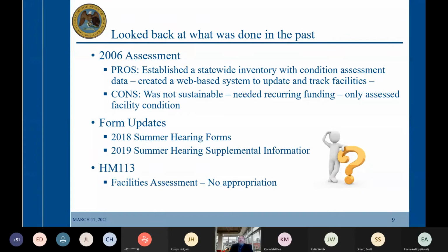That amounted to 17.3 million gross square feet of space. For those of you that were around at that time, you remember that 3DI Parsons are the ones that conducted the assessment. And in that assessment, as a whole, higher education facilities were scored with an FCI of 35.13%. This assessment provided current facility condition data, cost budgets, prioritized current deficiencies, and forecasted future deficiencies.